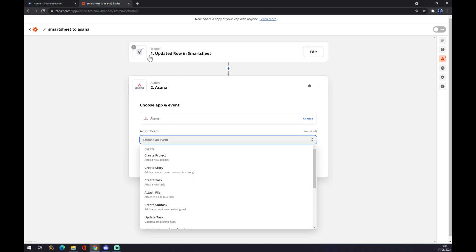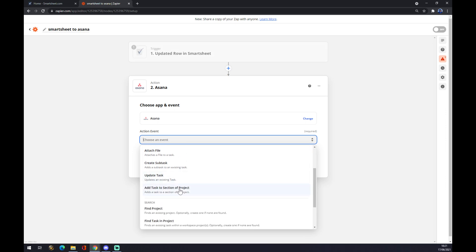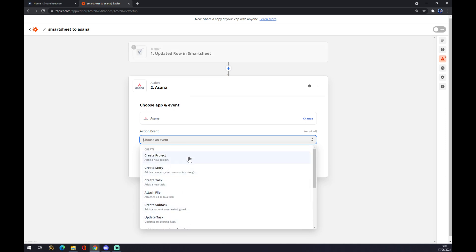So when a row is updated in Smartsheet, it will affect all of these things in Asana. Let's say you update it and it will create a project or create a task.